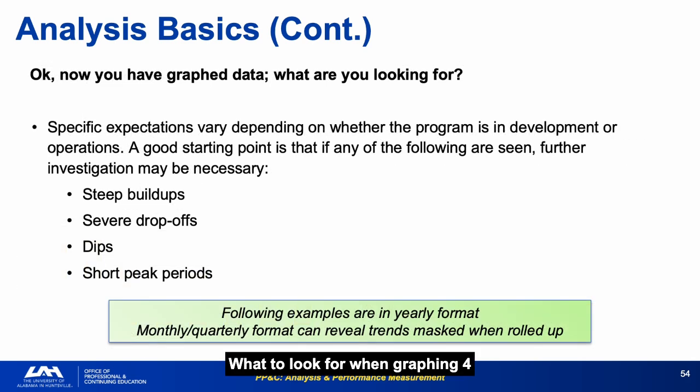What to look for when graphing? Four specific patterns warrant further investigation: steep buildups, severe drop-offs, dips, and short peak periods. These are not automatic red flags. They're signals that something needs to be explained. The explanation may be perfectly reasonable. The problem is when there is no explanation.